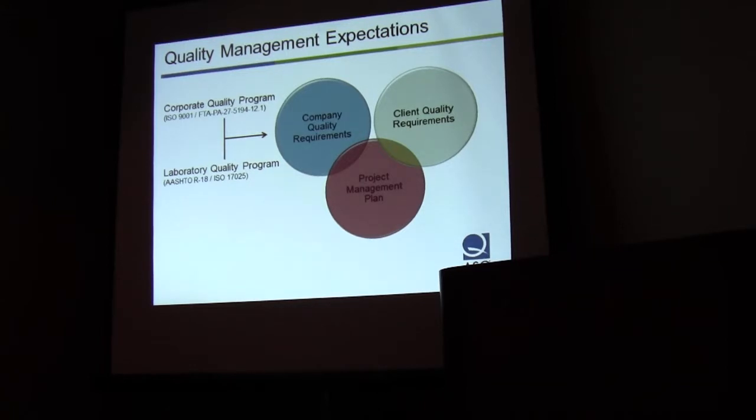Testing laboratories typically have to conform to the ASQ R18 criteria for quality. And inspections usually have to be done in accordance with ASTM E329, which lays out quality requirements for agencies involved in the testing or inspection of construction materials. I do expect you to remember all these acronyms. There will be a test.